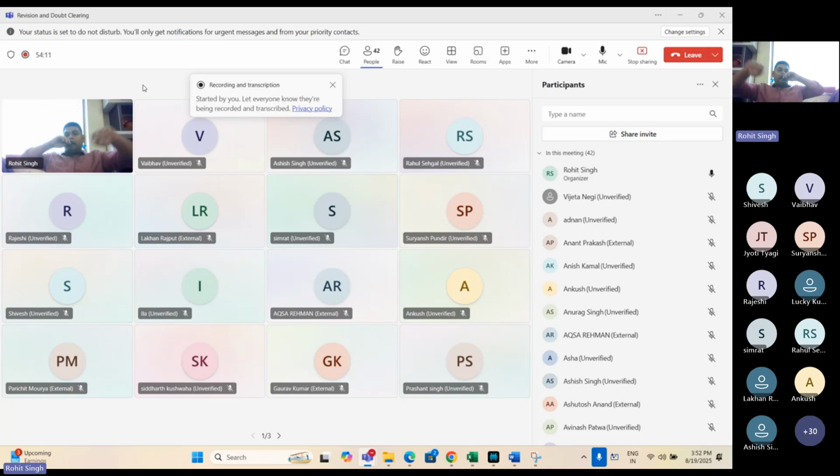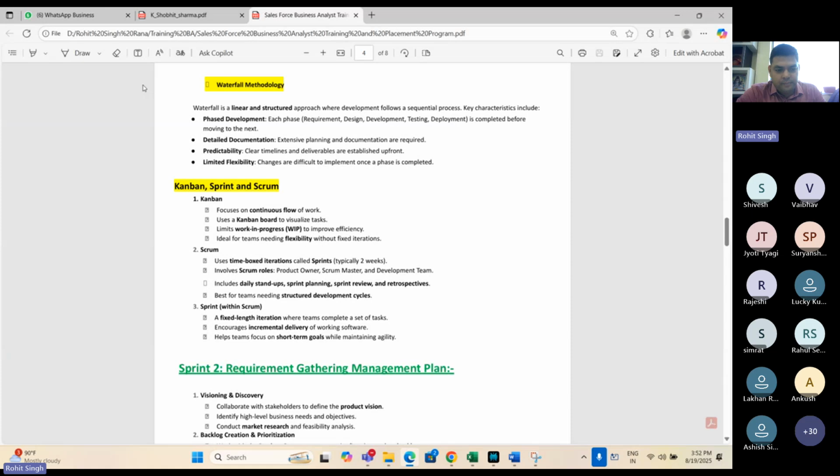That means last time we ended up starting the sprint with only one business analyst, 2 quality analysts, and 4 developers. But we have done the retrospective, and we need 6 developers, 2 QAs would matter, and 2 business analysts are needed. So this is the retrospective that we've done. So this is your Scrum.